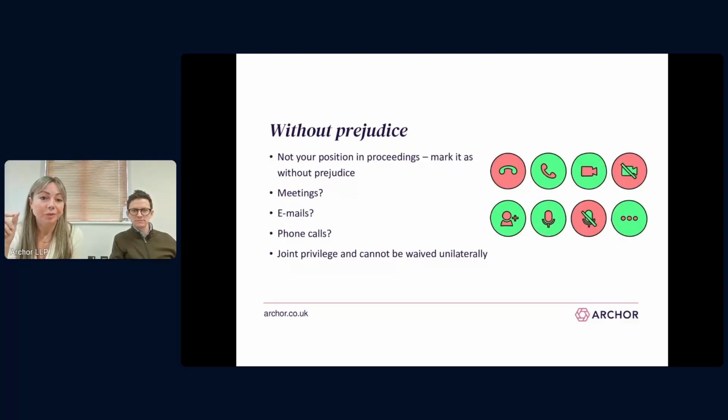Now, final point to note on without prejudice is that there can only be waiver of without prejudice privilege if there is the consent of both parties. So one party cannot by itself waive privilege to without prejudice communications.